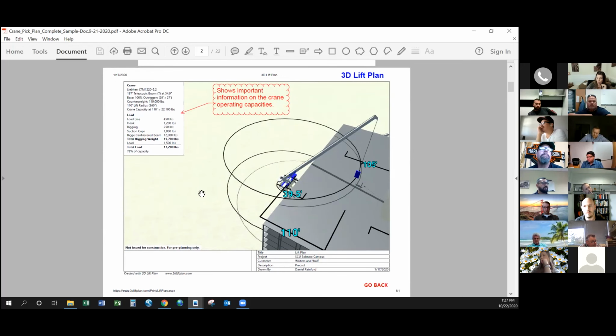I would like to add one thing that's somewhat important that you're probably going to come across in the project. It's called the outrigger ground bearing pressure. Just like TJ said, that's very crucial because we don't know what's underneath the ground, right? We're going to start seeing this in some of the buildings when we set up a crane on top of the fire lane, and it's going to need some shoring reinforcement. So we don't dispatch a crane without the GC submitting back to us the crane placement, because that crane might be fit only for 40-ton specs, and we're sending out a 90-ton crane. So the outrigger and the shoring don't meet each other. That's why this is very important as well.